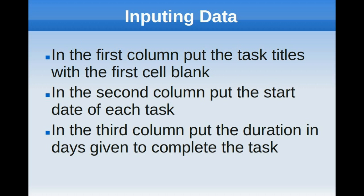The first thing you want to do is input your data. In the first column, put in all of the titles of the tasks and leave the first cell blank. In the second column, put the start date of each task, and in the third column, put the duration that each task will take to complete in days.